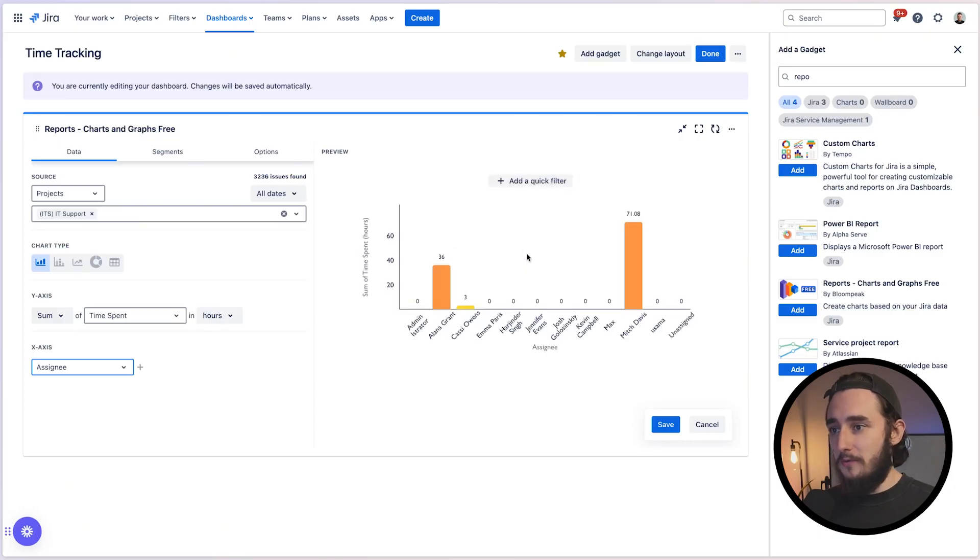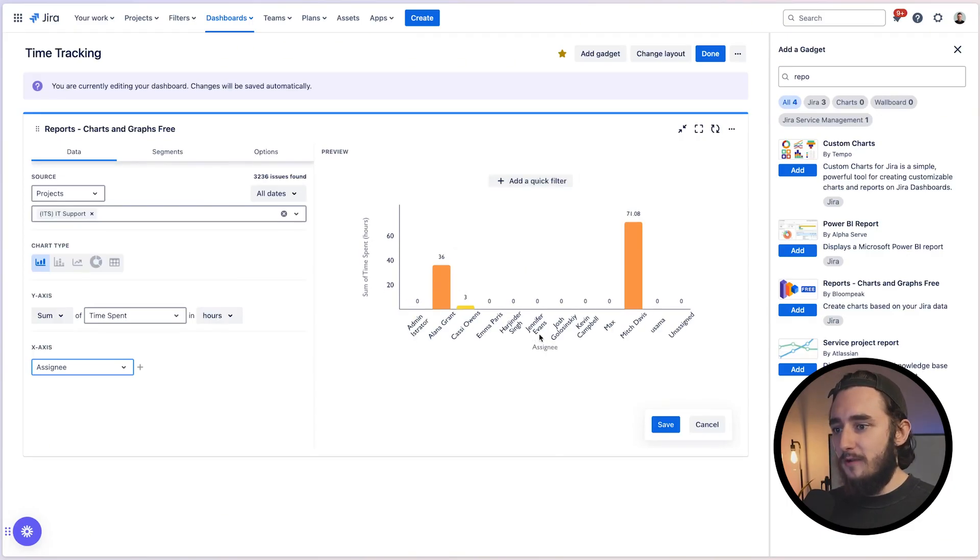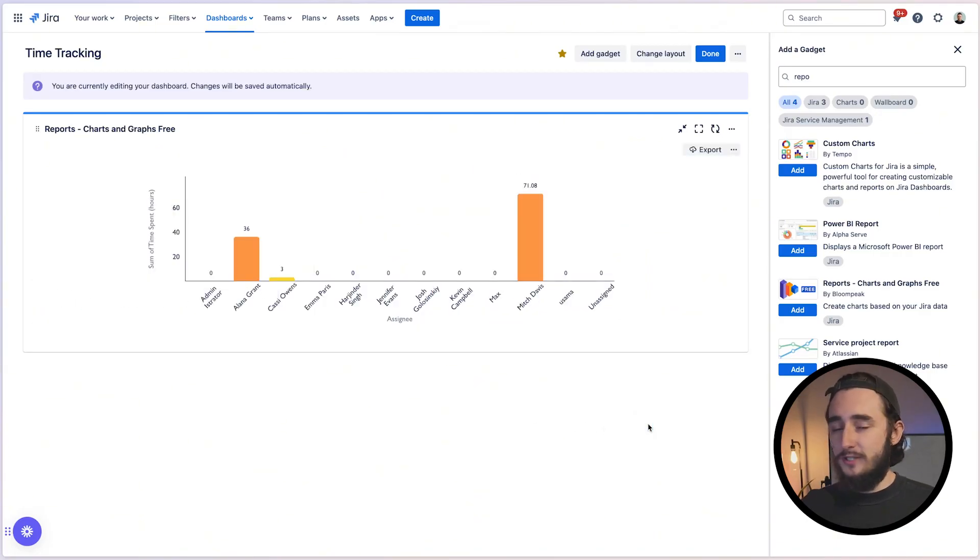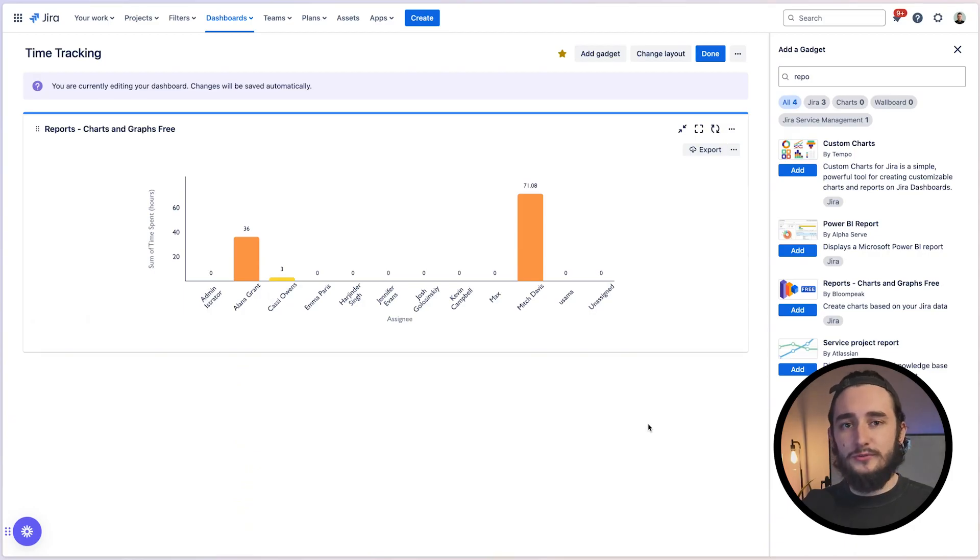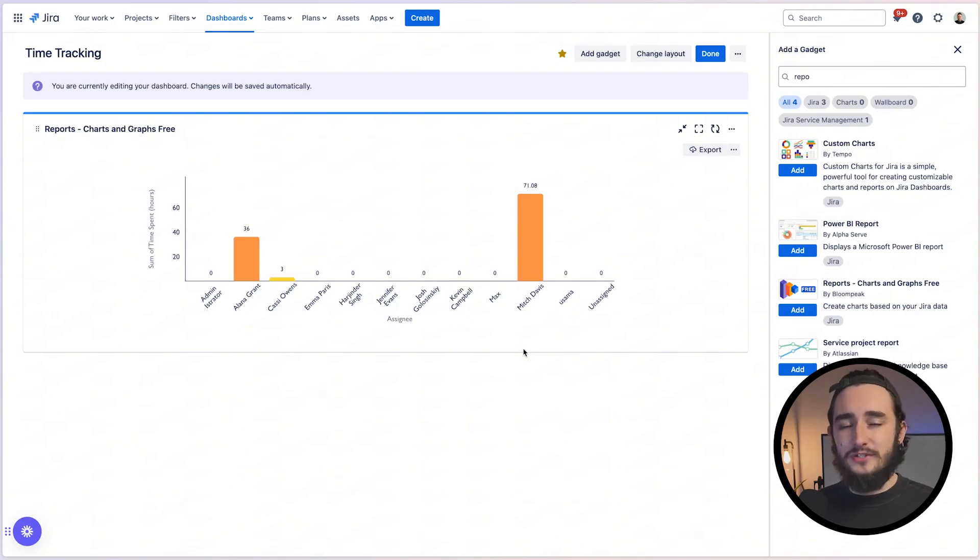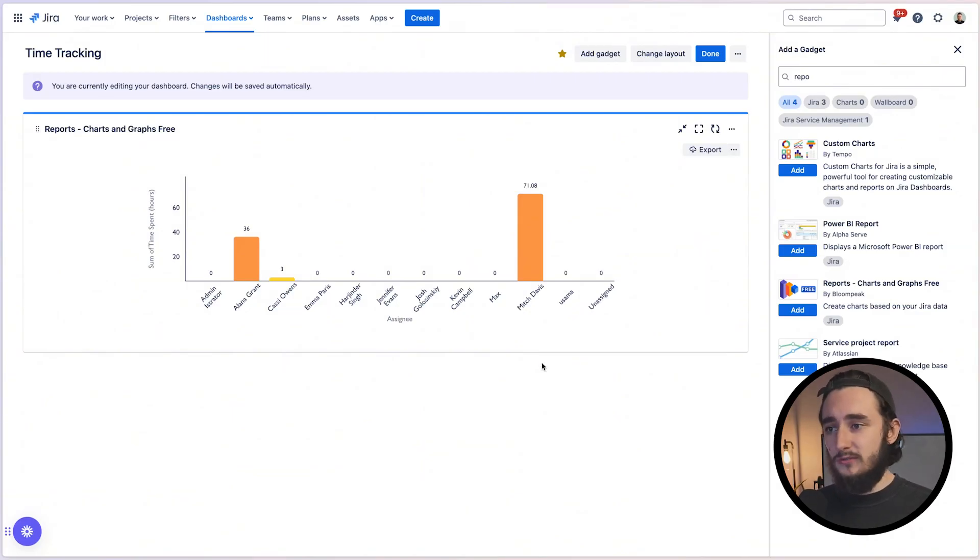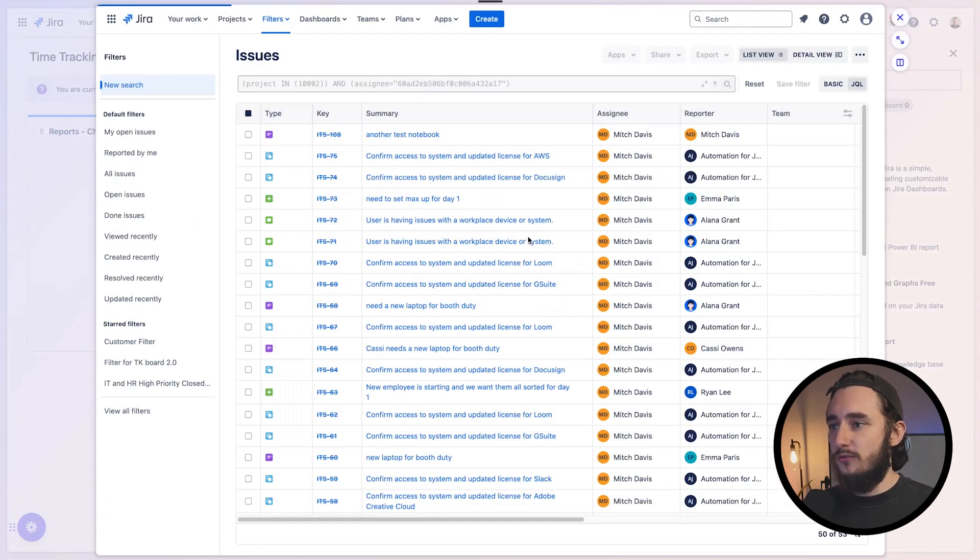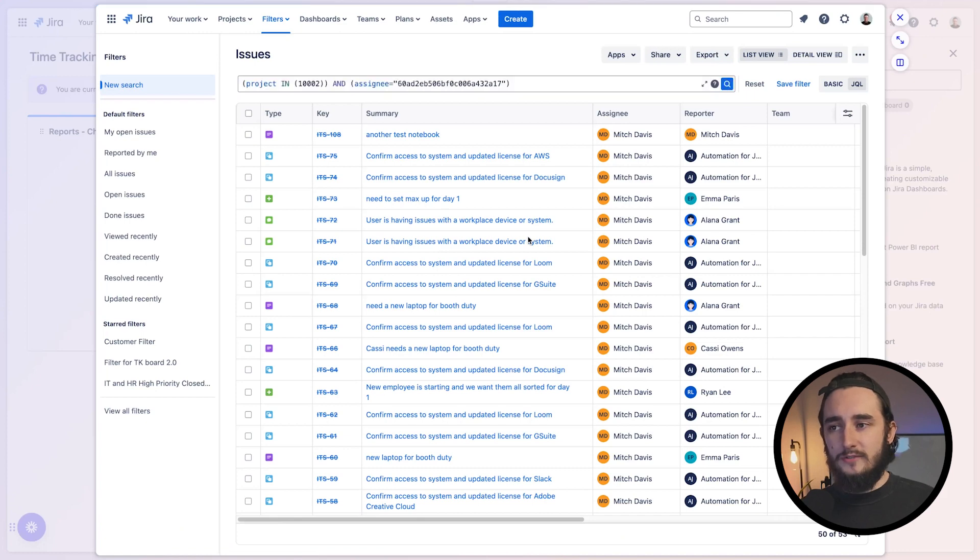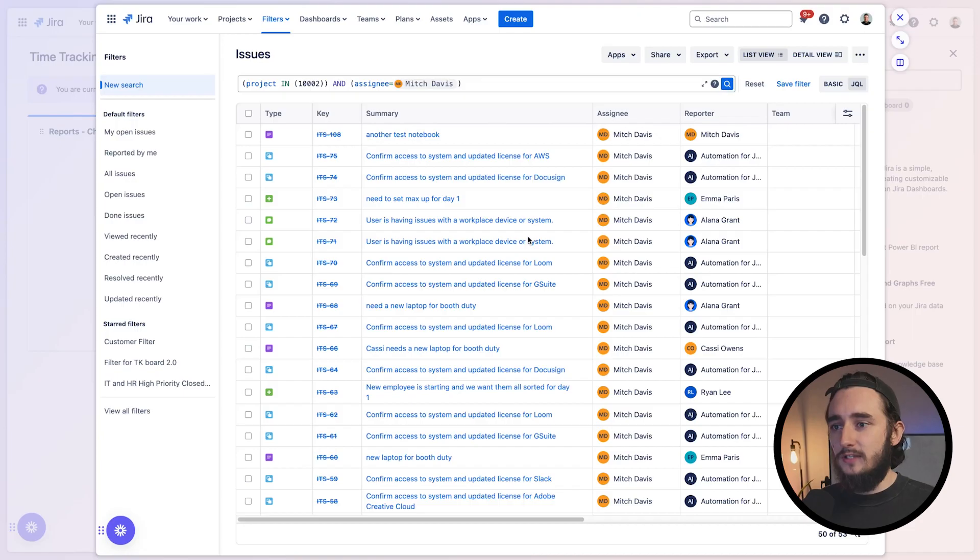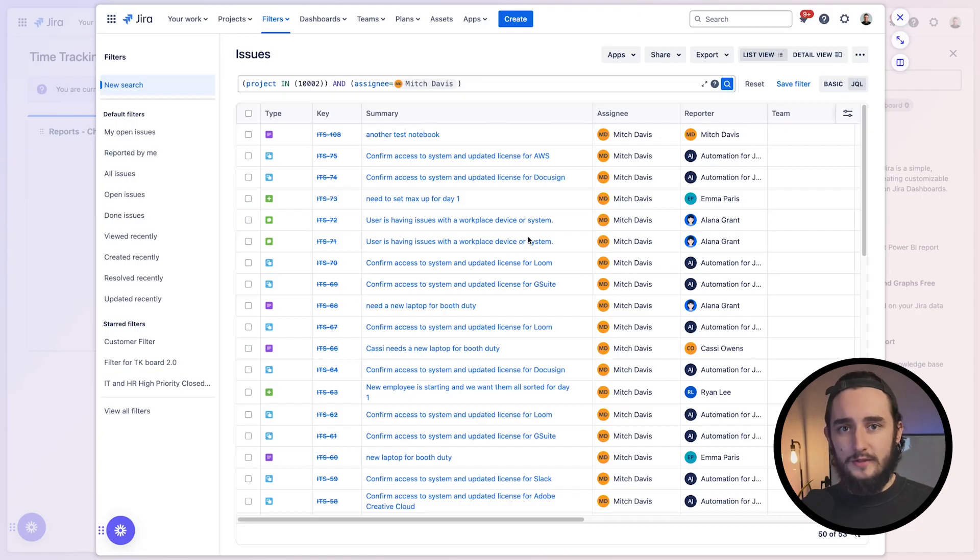And there we go. We have a time spent and then broken down by assignee. I'll go ahead and click save and our report is ready. Now you have all of your information in one place. You could potentially filter these results down to only show time tracked in the last month or in the last week. That way you always have all the information on the time tracking. We could also drill into this data more, which can be super helpful. I'll look into Mitch Davis and click on this orange bar. And that'll bring me directly to a filter with all of Mitch Davis's tickets that we have inside of the report. And I can actually start digging into these individually and seeing exactly where the time went.